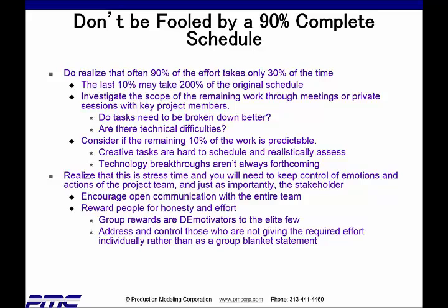Investigate the scope remaining throughout the meetings or private sessions with key project members. Do the tasks need to be broken down better? Are there technical difficulties? Consider if the remaining 10% of the work is predictable. Creative tasks are hard to schedule and realistically assess. Technology breakthroughs aren't always forthcoming.